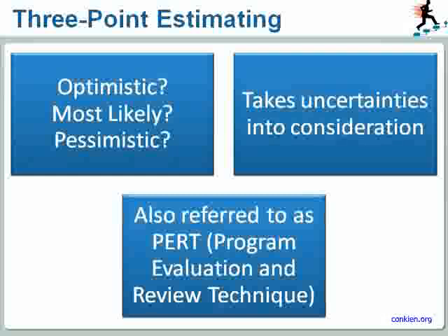It makes sense in the real world that you don't really know how long a particular activity will take, especially talking about certain activities such as research or development, and by having an optimistic, most likely and pessimistic estimate, we can now get a weighted average. As a project manager, you can use these 3-point PERT estimating techniques to gain a greater degree of control over how the end value is calculated. And the end value is, of course, this weighted average that I mentioned of these 3 estimates.